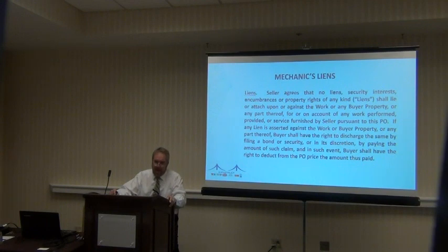You cannot do that under Kansas law. The Kansas Fairness in Private Construction Contract Act says you can't do it for liens. The Fairness in Public Construction Contract says you can't do it for bond claims. You can't do it. It could be in a contract. Guess what it's worth? Zippo, zero, zilch. It is not enforceable.